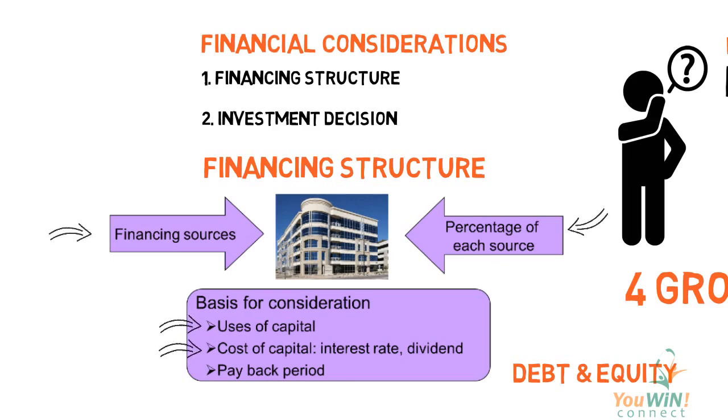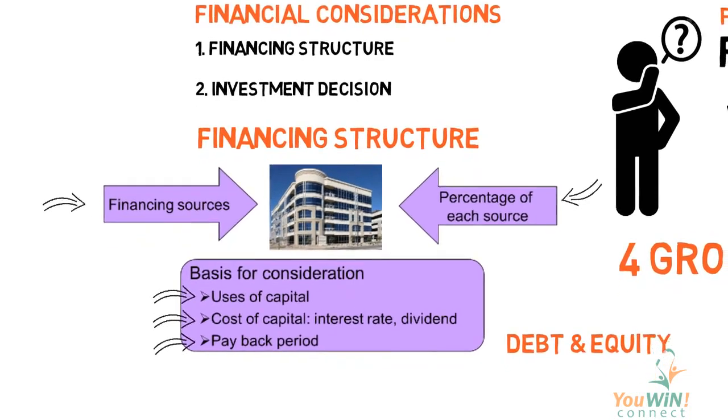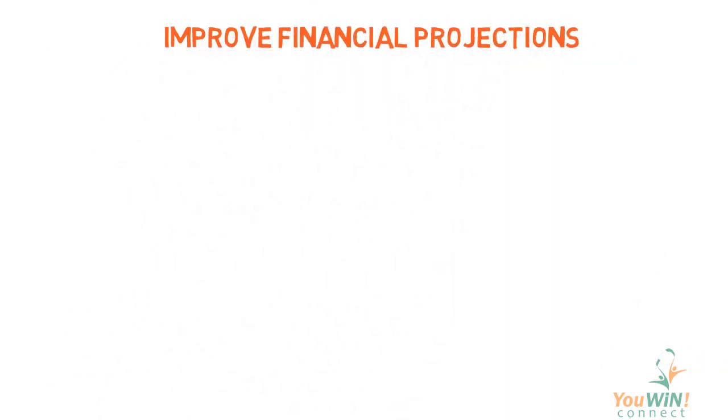The other consideration that we look at is payback period. The payback period is defined as the time required to repay all of the invested funds from the money generated by the project. This is one of the most common appraisal techniques. When using this technique, the best project is the one with the shortest payback. So, let's look at how we can improve financial projections.